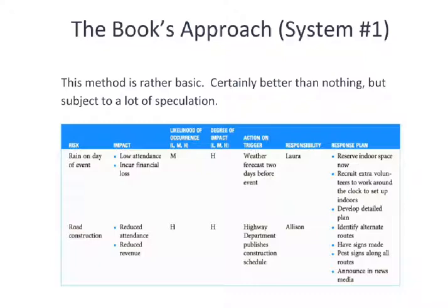So we have two risks shown here. We have the risk of rain or a weather delay happening on the event, and if that occurs, we're trying to do an outside event, the weather could impact things, we need to realize that this risk can occur. May not occur, can occur. Okay, what is the impact? Once we understand the risk, we need to think about the impact. The impact of this would be lower attendance.